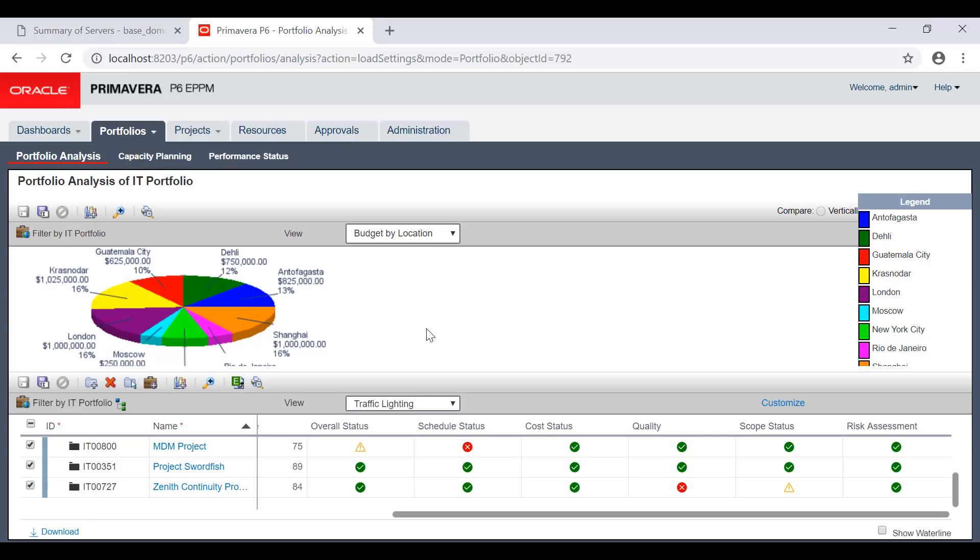The baseline is a baseline. If you want to change something, you need to change the baseline before, so the change will be monitored also. And if you have very good security administration here in the EPPM, nothing will go inside unless approved.